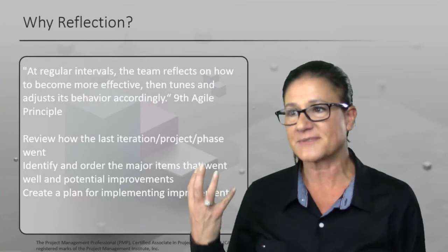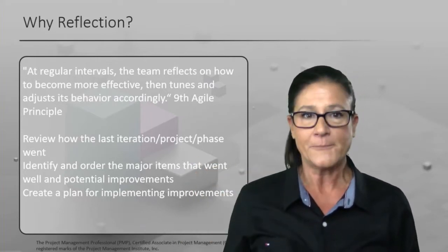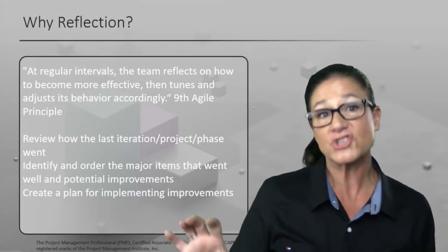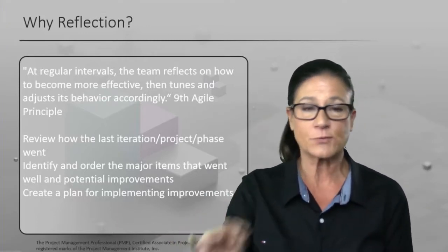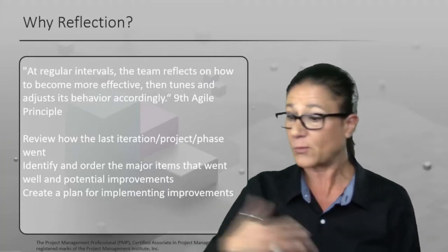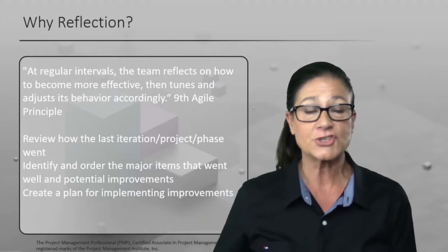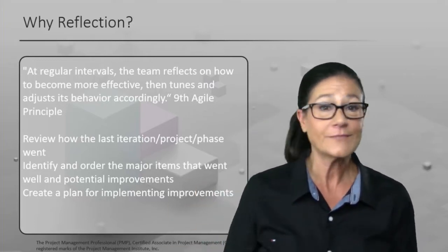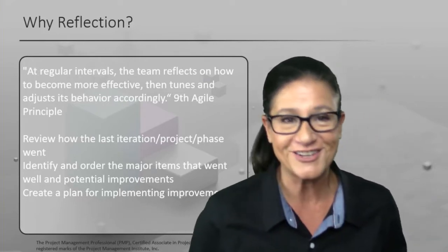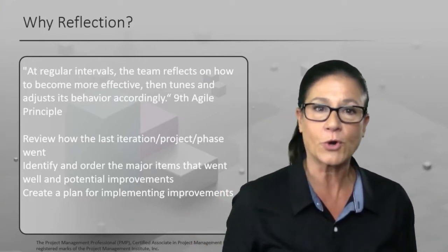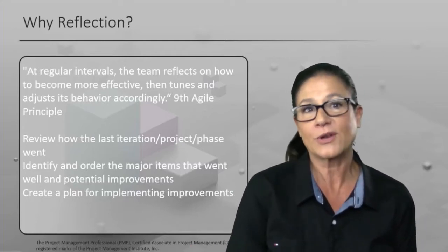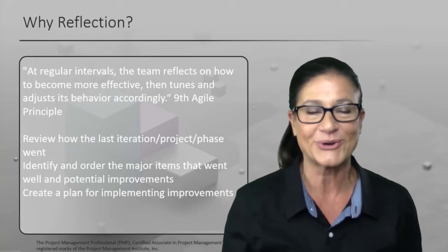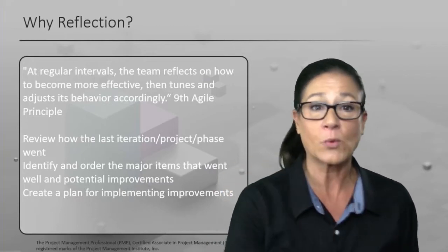So the whole concept of a retrospective is to look back. Now, if it's an agile type of project, chances are you worked in an iteration length of maybe 2 weeks to a month. So the retrospective would happen at the end of that iteration, and we'd be able to look back at that iteration or possibly ones before that and try to figure out what went well, what did not go so well. What empirical knowledge have we learned? And as we go forward, what types of improvements are we going to make? And the power of a retrospective is the ability to plan and implement right away.